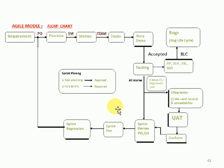In the scrum meeting, three things are discussed: what work you have done from the last scrum to today's scrum, what your plan is for tomorrow, and what issues you are facing. These are all interview questions they may ask about the Agile model, including what your process is. This is the complete real-time process.